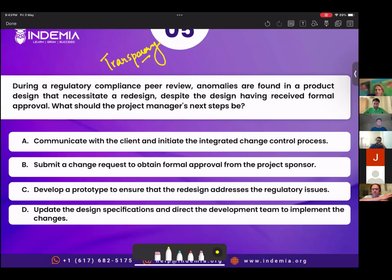And like I said, I was just between that and the sponsor, and it doesn't say whether this is waterfall or agile. I know in agile the sponsor kind of controls the backlog, but in waterfall, in projects we do, if there's a problem, that gets communicated to us as the owner. We hire out PM teams sometimes to take care of our big capital projects. And when there's an issue, they do come to us, and then they'll propose a change order, and then they'll go through the change. But we do want transparency so that we know what we're expecting.